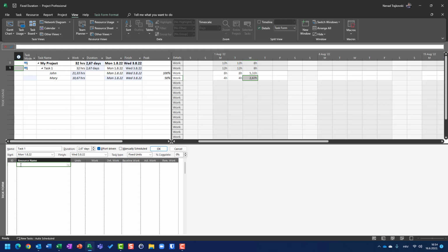Let me show you one example which will give you a clearer situation. Let's say that I have 6 days, and I have John here. John is going to work 6 days multiplied by 8 hours per day, which is 48, multiplied by 100%, so it's 48 hours. If I assign Mary here, and I say 50%, you will see that John and Mary are going to work: John 32 hours and Mary 16 hours.